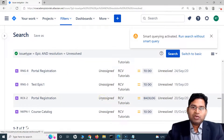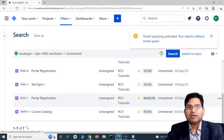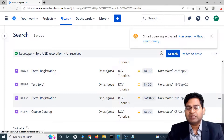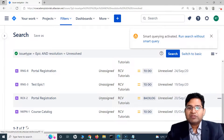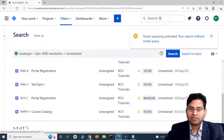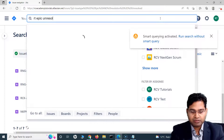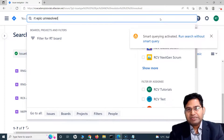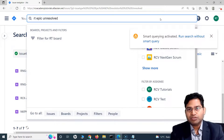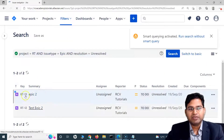This is how you filter issue type, resolution, and priority with smart query in Jira. You can also create more complex queries — put the project keyword to filter by project, add the issue type, and add the resolution. For example, to get all unresolved epics in the RT project, simply enter the project key, issue type, and resolution together.